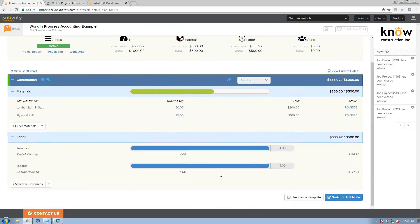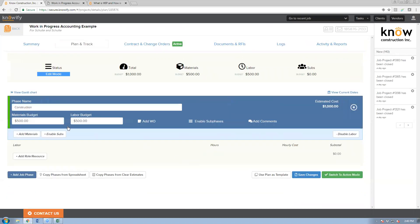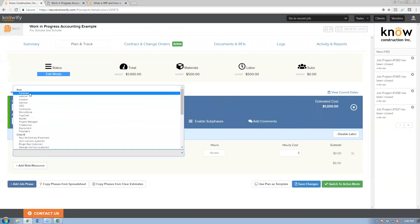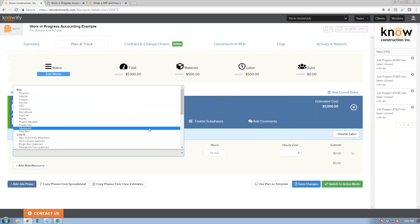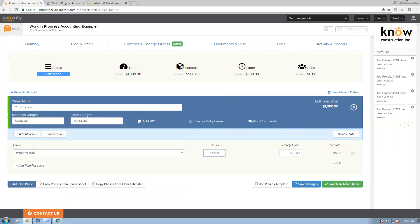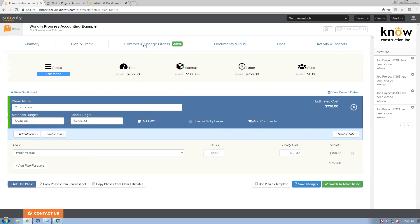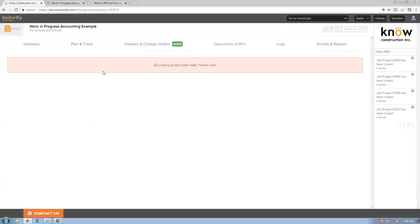The reality is the more time you spend building a detailed budget, the more accurate and detailed reporting you're going to get when you're tracking your actual versus estimated in Knowify. I went really high level with this budget. Just to show you what I built — I said $500 materials, $500 labor. But I could have come in and said I'm going to need a foreman, specifically chosen a type of worker, and set eight hours of that type of worker. These types of options are available if you want to get more detailed.